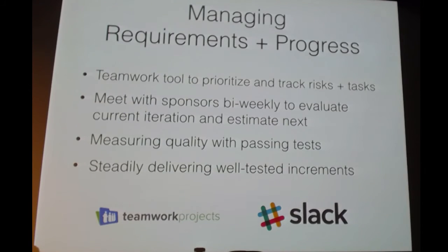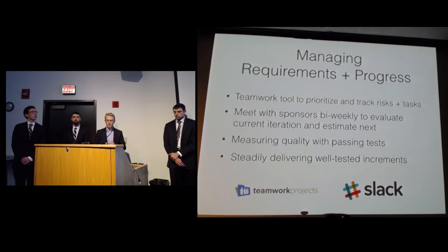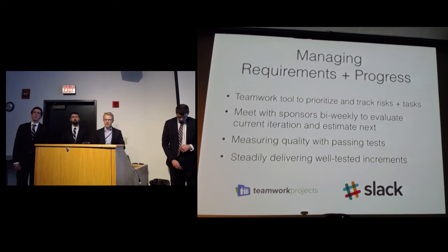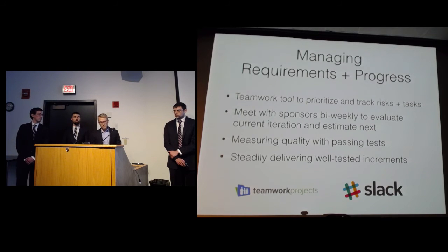At these bi-weekly meetings with our sponsors, we would come forth with all the tests that we ran in that iteration, and these would serve as a metric for quality. Again, testing is extremely important in this project. We review our tests during each of these bi-weekly meetings, and then we'd handle changing requirements based on our accepting or failing tests.